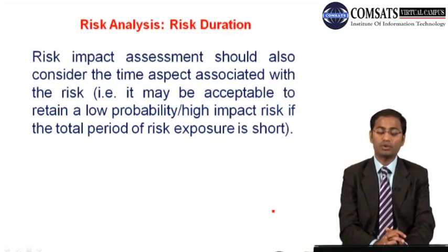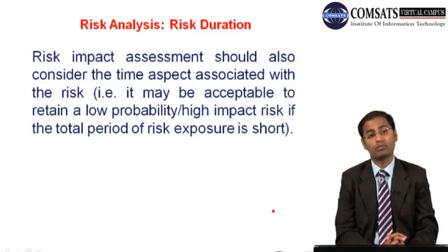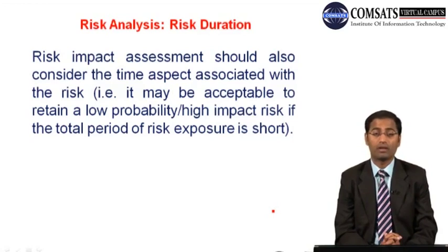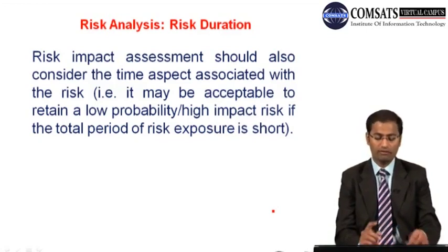So risk impact assessment should also consider the time aspect associated with the risk. It may be acceptable to retain a low probability, high impact risk if the total period of risk exposure is short. But if the duration is long, then you do not want to retain that high impact, low probability risk, you want to do something else. So your strategy will change as far as response is concerned. For that, you will have another set of parameters, right? So impact assessment is very much dependent on the duration part.